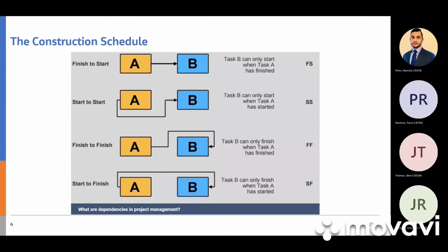Let's start with finish to start. A good example of finish to start is installing drywall. It makes sense that you cannot install drywall until you have framed and insulated your walls.